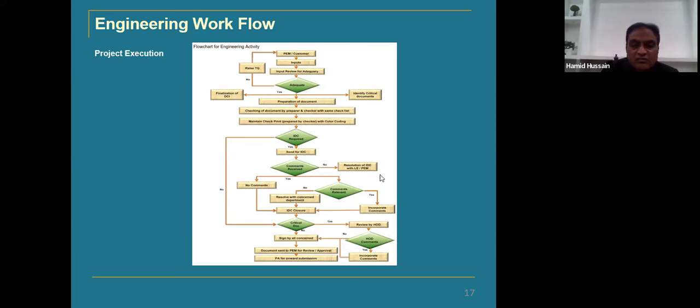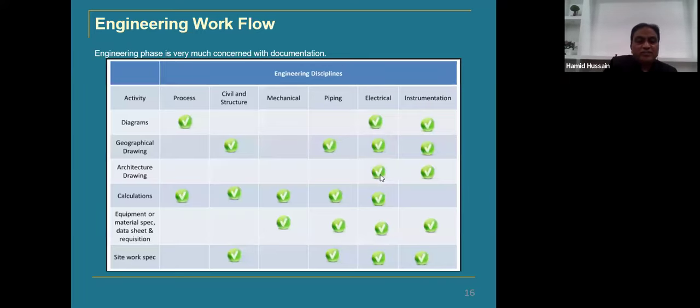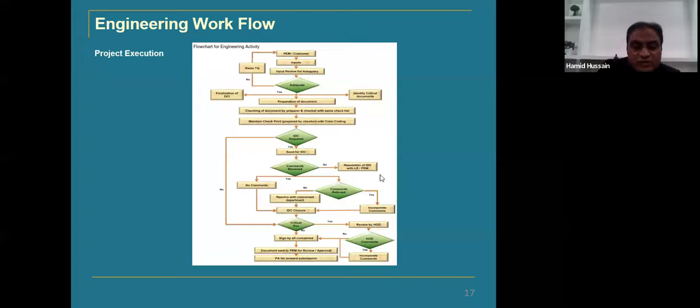So that will be there, and then we will start preparing documentation and then checking and all those things. That interdisciplinary check, once we have these phases, then definitely all these engineering disciplines will interact with each other. So once they interact with each other, then we call it interdisciplinary checks. Any document when we are issuing needs to be checked by other relevant discipline engineers.